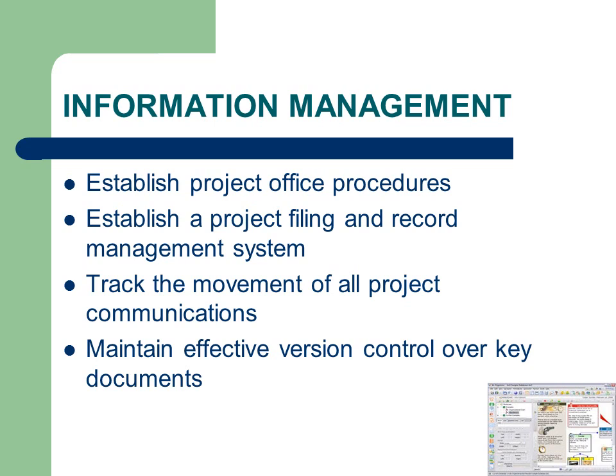Information management involves storing project communication so that it is readily accessible by all those who need it. It involves ensuring that project information and documents are distributed to or can be accessed by the correct people. It involves ensuring that all documents have an appropriate version control so that everyone can determine whether they have the most up-to-date version. And lastly, it ensures that you have a strategy for archiving project documentation after the project is finished, so that it can be accessed if there is a requirement.